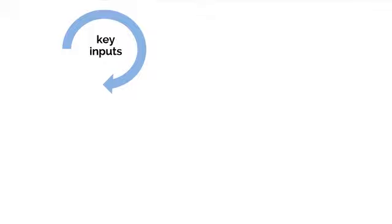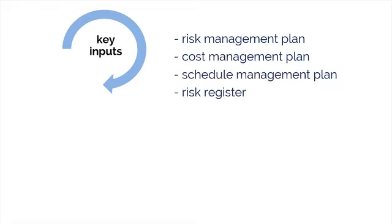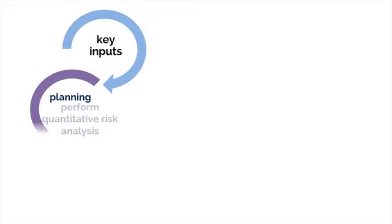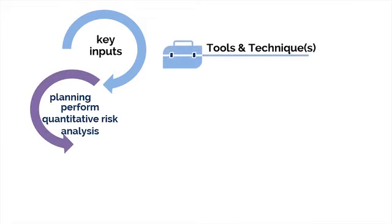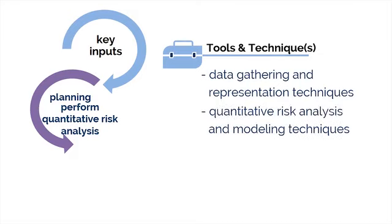The inputs include the risk management plan, the cost management plan, the schedule management plan, and the risk register. There are three tools and techniques for the Perform Quantitative Risk Analysis process. First, data gathering and representation techniques, which can include interviews and probability distributions. Second, quantitative risk analysis and modeling techniques.